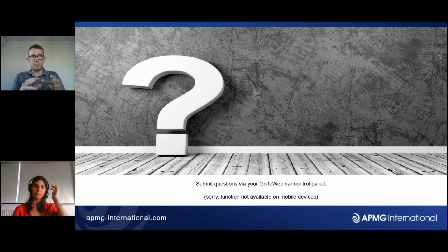So the product of design thinking will be the product description for the project. We place DT method in the pre-project phase, to develop the solution of design thinking.